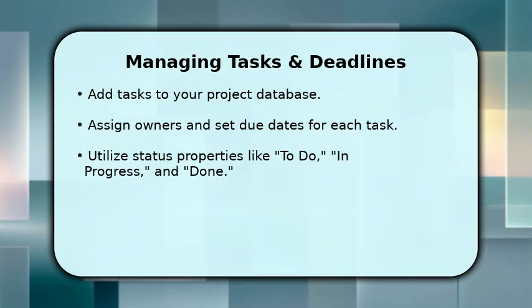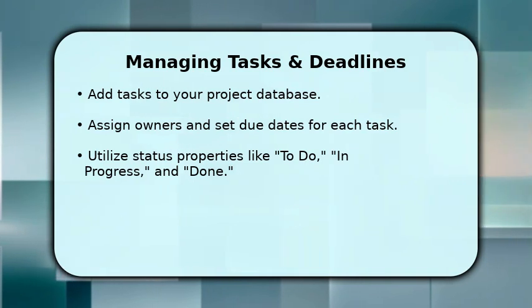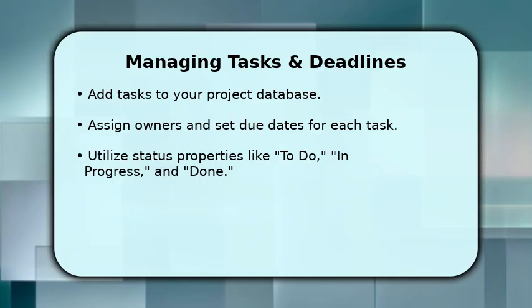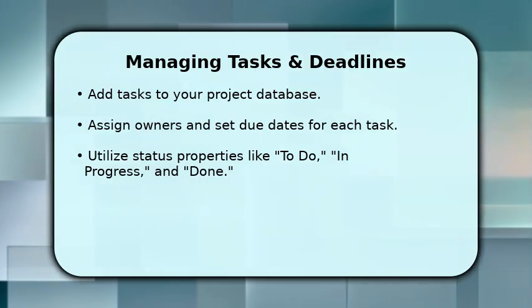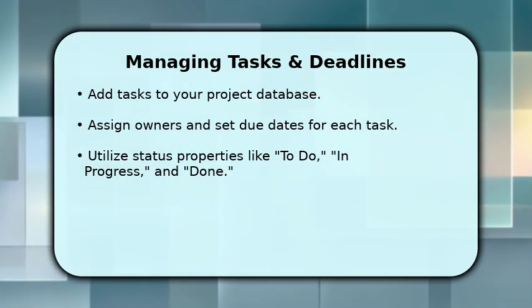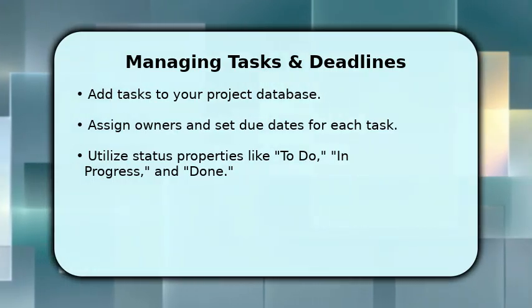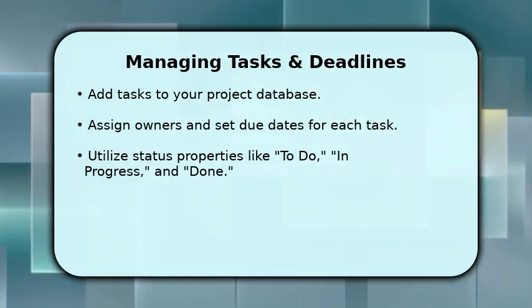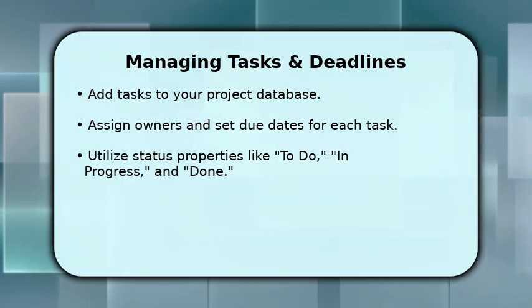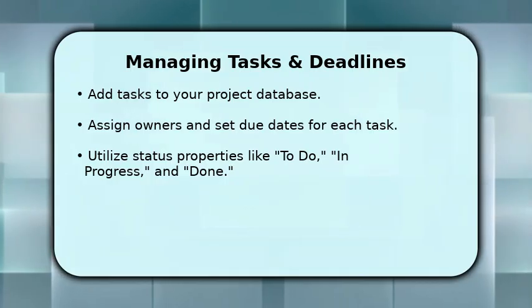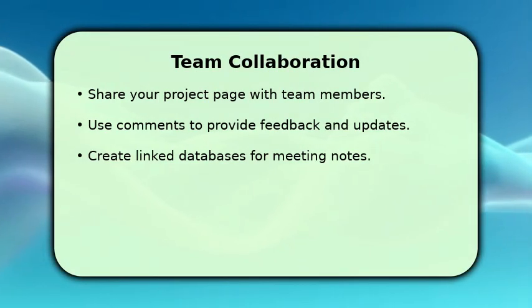Now, let's manage your tasks effectively. Add all individual tasks to your project database, ensuring each one is clearly defined. Assign a specific owner to each task and set a realistic due date to keep everyone on track. Use Notion's status properties, such as To Do, In Progress, and Done, to visually track the progress of every item. This helps maintain clarity.